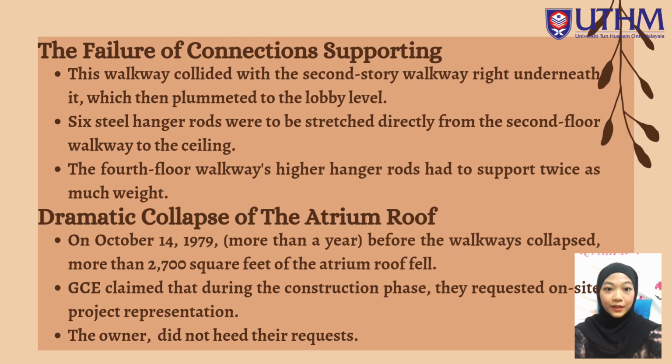The other reason why the SKYWALK failed is caused by the failure of the connection supporting the fourth floor walkway ceiling rods. This walkway collided with the second story walkway right underneath it, which then plummeted to the lobby level. During the construction, an apparent design defect was found. 6 steel hanger rods were to be stretched directly from the second floor walkway to the ceiling to provide support in the original design. However, the steel fabrication contractor objected to this design since it called for screw threading rods to hold the walkway on the fourth story in place.